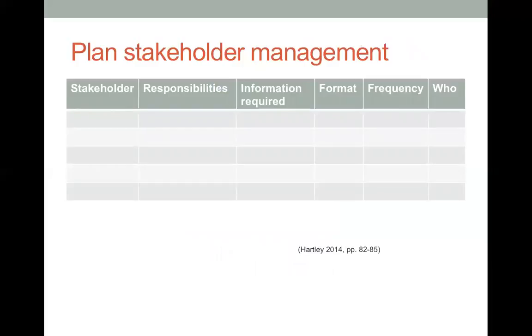Okay, now managing stakeholders, we can also use this template. So we have the stakeholder, the responsibilities, what information they need from us, what formats of information they need, what frequency we need to update them, and who this person is. So we can outline the stakeholders accordingly.